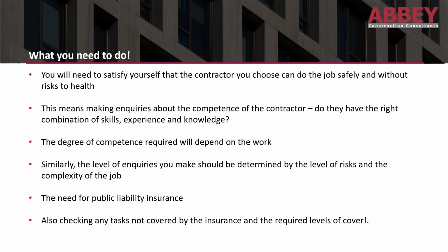So, for instance, Abbey Construction is insured to do health and safety advice, health and safety management systems, to provide client advisor service and to provide the principal designer service. So all of those services that we provide are clearly stated on our insurance documents, and that's what you would need to look for. Don't just look to see that they've got public liability insurance, but focus into it and make sure that it's at the level and covers the work that you require.